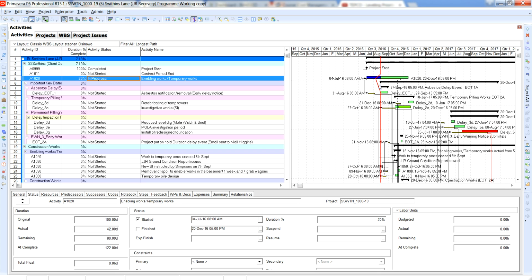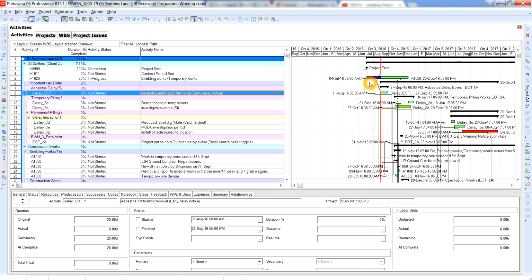schedule. Right? So when you look at what the effects of that is, this is a start with this activity, asbestos. And what has that done to the asbestos activity? It's pushed it out. So basically it's off the baseline and it's moved, it's kicked out. So basically a term to use for this particular instance is that the program's kicking out, right?